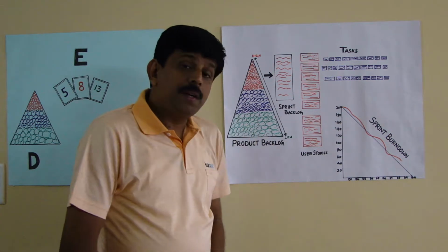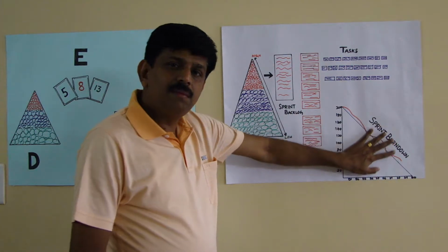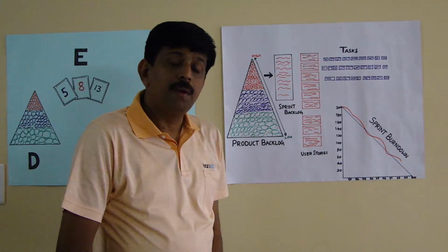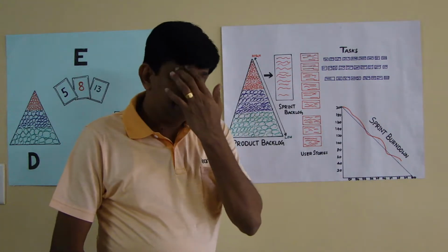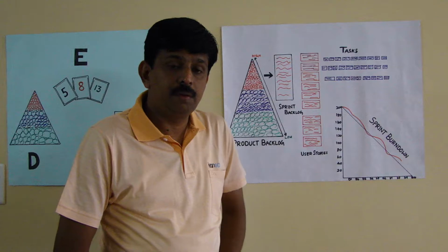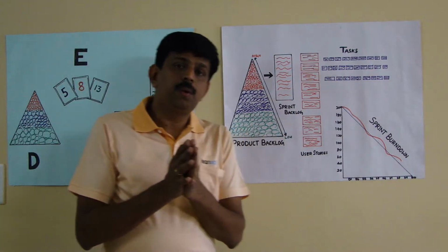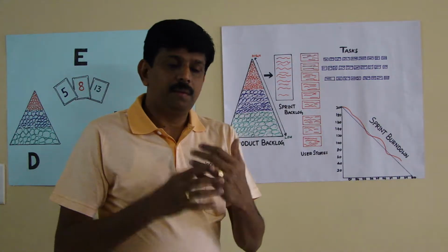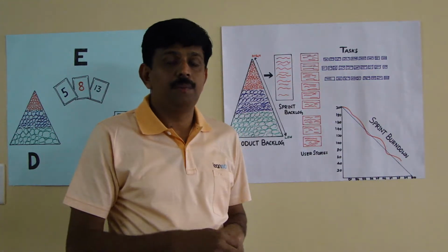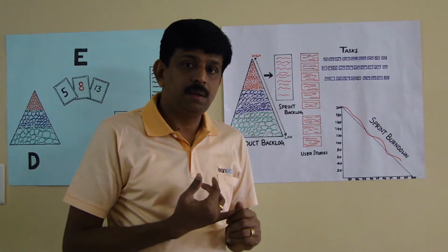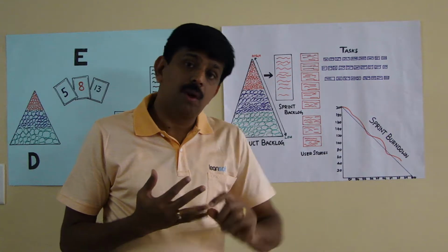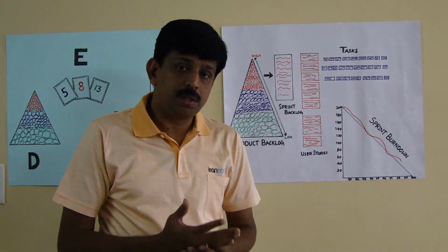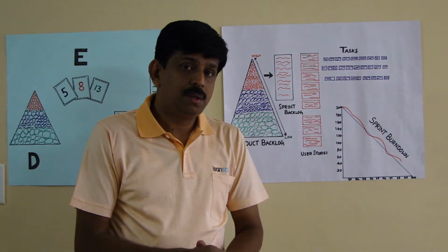Yeah. What's the difference between project tracking in a sprint burn down form as against the traditional way of measuring it? In the traditional world, what we do is we say that this task is complete, so we are 20% done. Let's assume that requirements is fully understood, right? 20% of the task is done. Design is done. Another 20-30% is done. Coding is done. 30% more is done. So we are done with 80%.